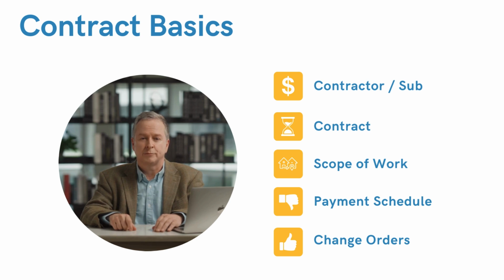When the contractor tells you they are finished, then schedule a walkthrough of the property to make sure that all the finishes look good and that everything's done correctly. If something isn't done right, then let them know and have them redo it. Typically, this is called a punch list. Then schedule another walkthrough. Once everything is accepted, then both parties can wave goodbye and look forward to the next deal. So these are the basics that I want you to be thinking about.